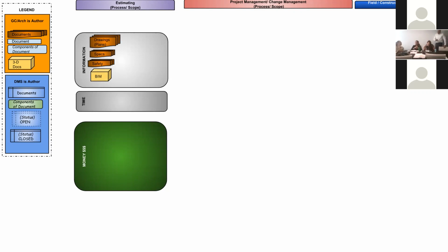Sometimes they'll ask for BIM, and BIM stands for Building Information Management. It is a 3-dimensional set of documents that allows them to create the project virtually and walk through that project and find clashes. You'll hear terms like, where's your model at? They'll bring all the models from all the different trades together, and then they'll do what they call a coordination meeting, which will then lead to clash detection.